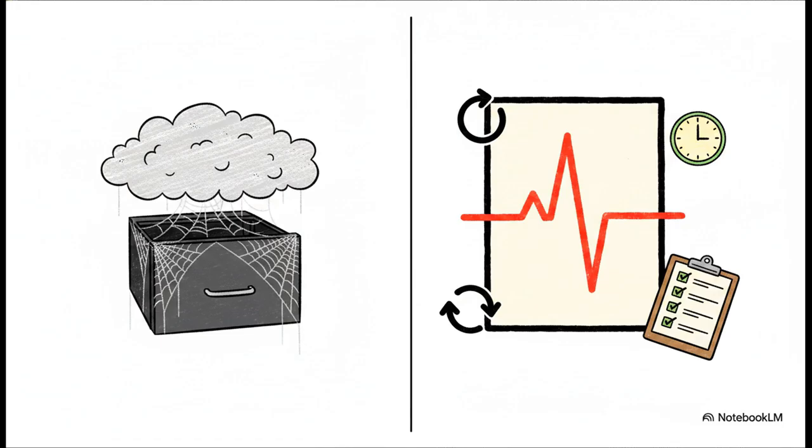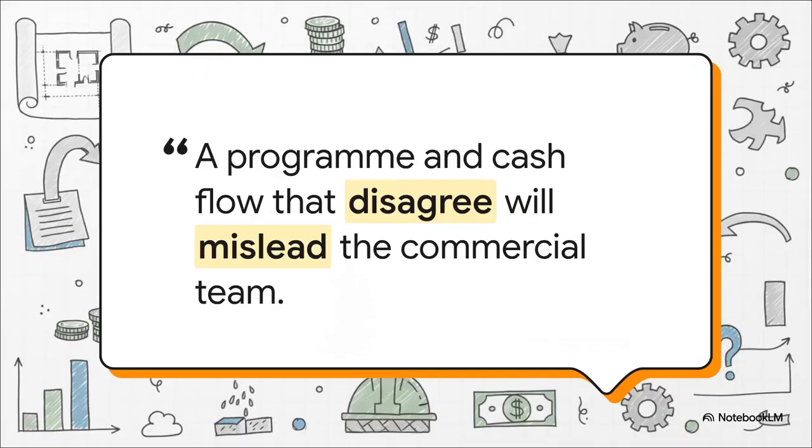You've got to check actual payments received against what you predicted. You have to factor in any revised subcontractor and supplier costs, and of course, you add any approved variations right into the overall value. But here's the absolute biggest one. You must factor in the revised program for any delayed works. Which brings us to this incredibly critical warning from our source.